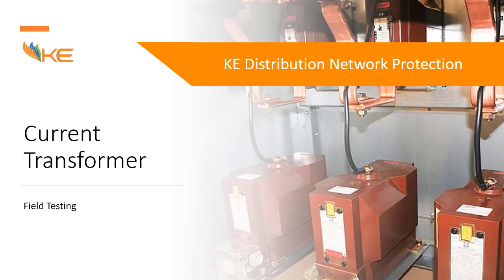When the CT is at the panel in the factory, the factory performs a procedure called acceptance test, called FAT - the factory acceptance test. The delivery to the site doesn't mean you shouldn't check the circuit or CT.